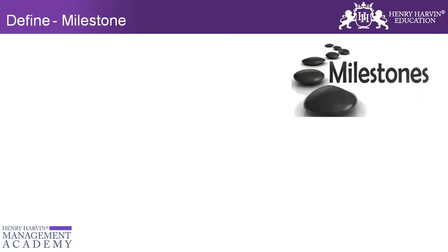Then we focus on milestones. Milestones are for each and every phase that we have — Define, Measure, Analyze, Improve, and Control. I need to give a milestone. This is like a project plan summary — not a detailed project plan or a Gantt chart — wherein I should be able to mention by when I would be able to complete each phase.